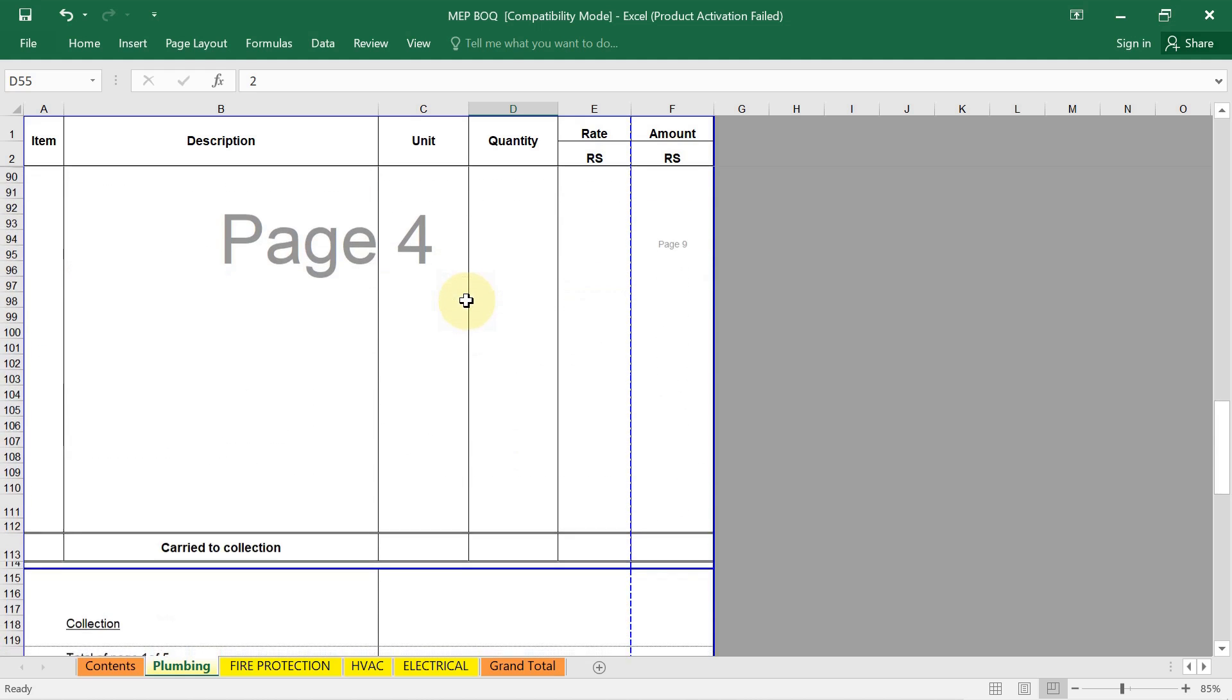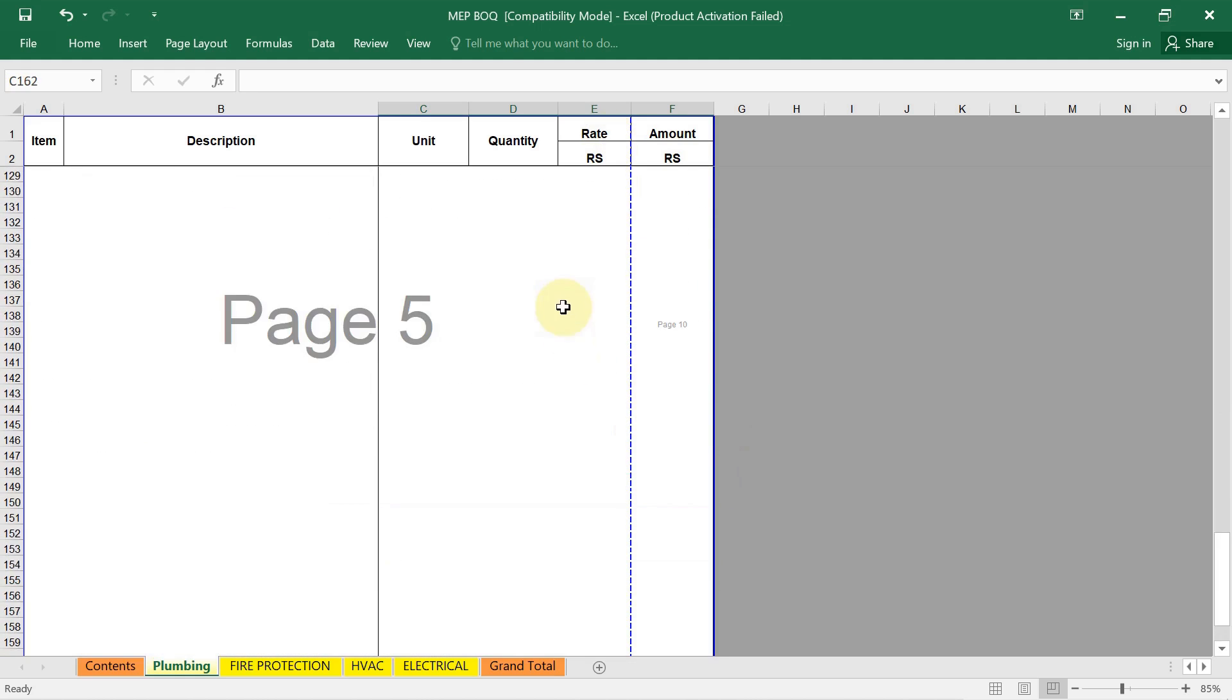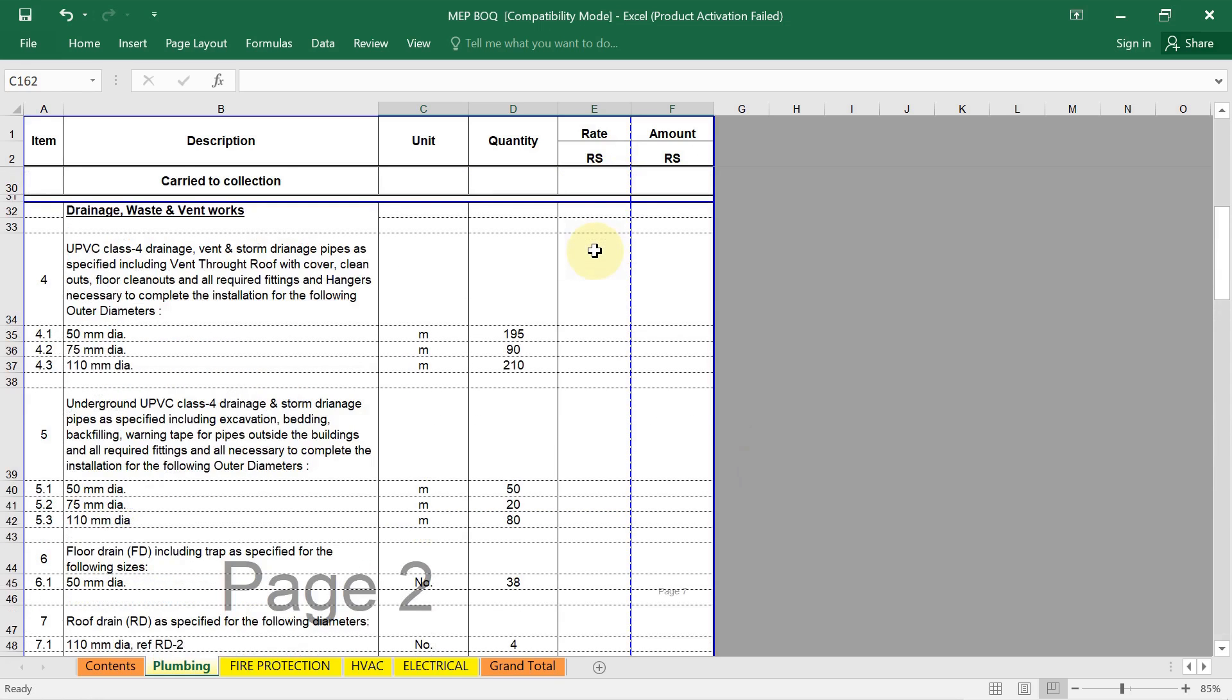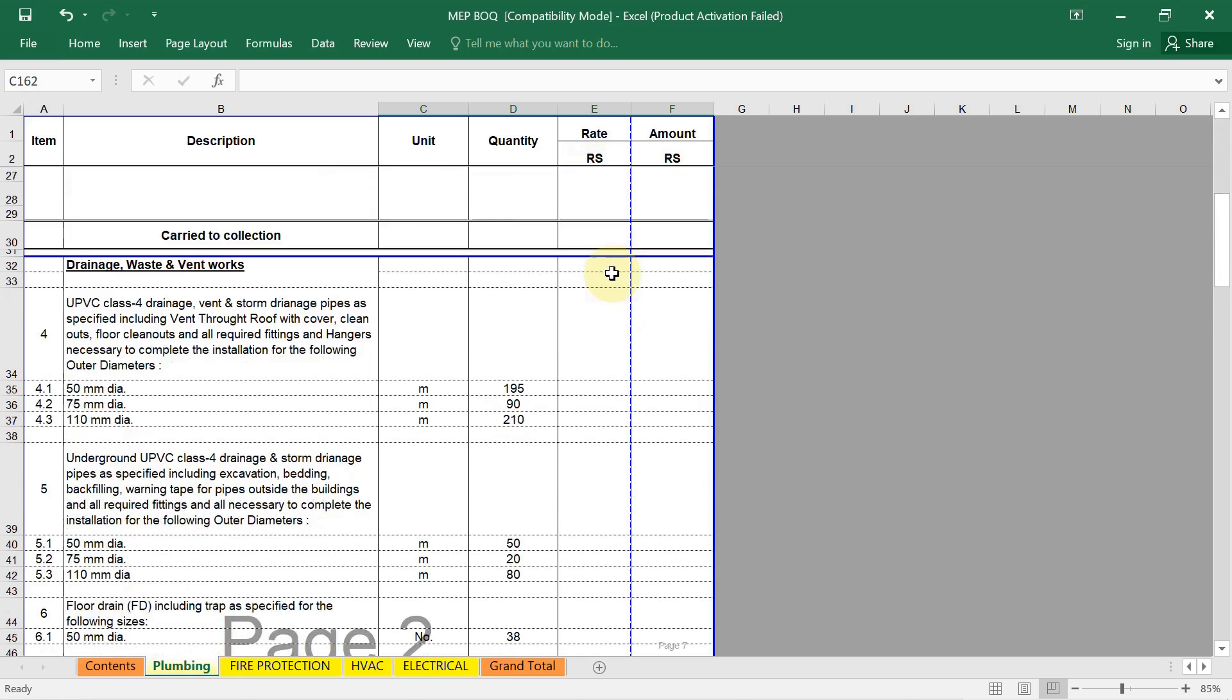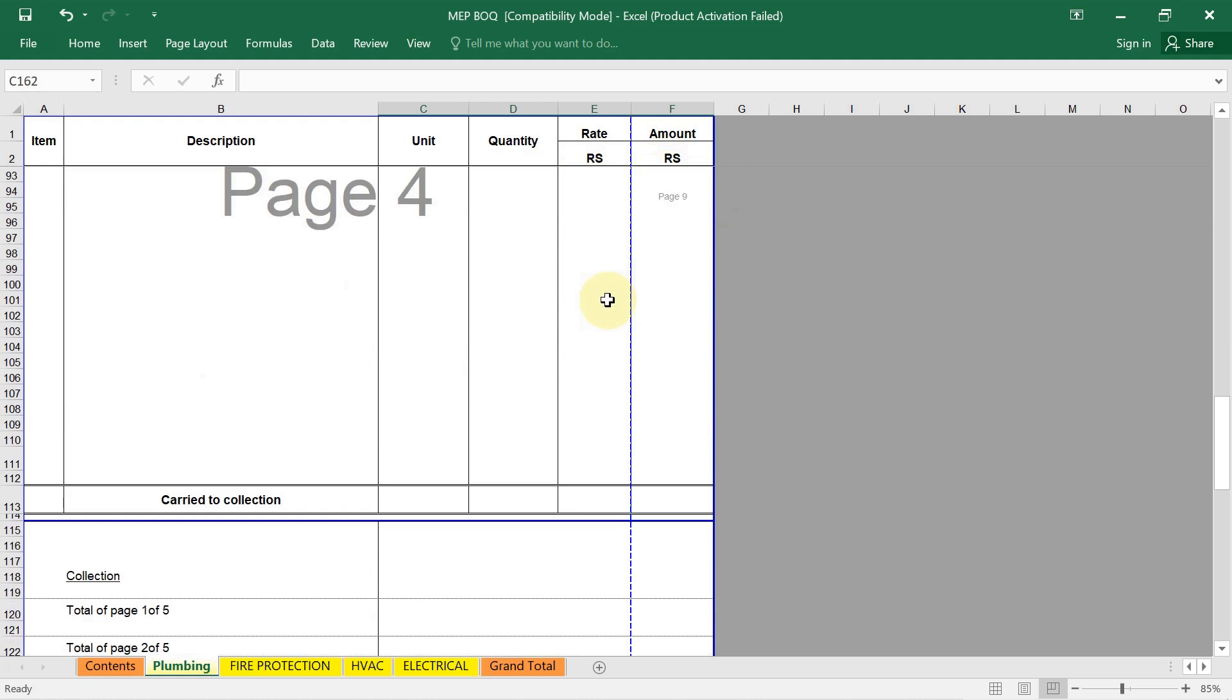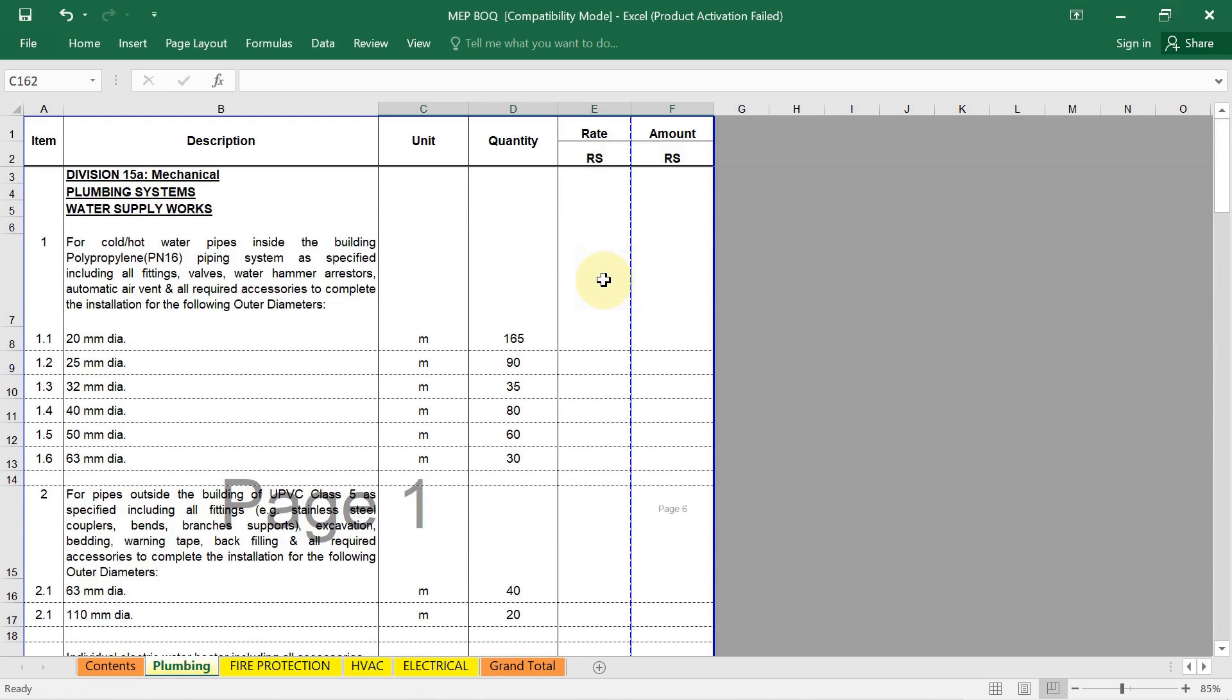Finally here you will get the total amount. Because the unit rate, as I told you, from where you will get the unit rate? Unit rate for each item is totally based on the market price or the supplier quotes and historical data. You will get this detail. To get the total amount, what you have to do? Quantity multiply by unit rate of each item, you will get the total cost. In this way generally we have to prepare the BOQ for plumbing work. I hope that all of you enjoy this session. See you in the next one.